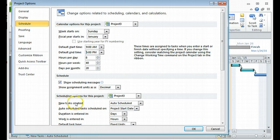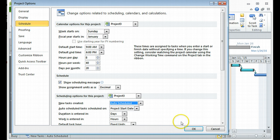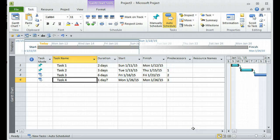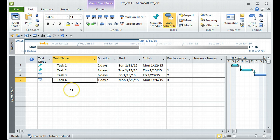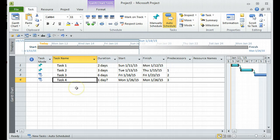You can also change new task creation from manual to auto on this same Options screen. I'll keep it as auto and click OK. So this project will now use 9 a.m. to 6 p.m. as the standard working hours. This is important for later tutorials when we assign resources, as allocation issues and things like that depend on the working hours defined. It's always advisable to do these initial configurations when you start a new project.